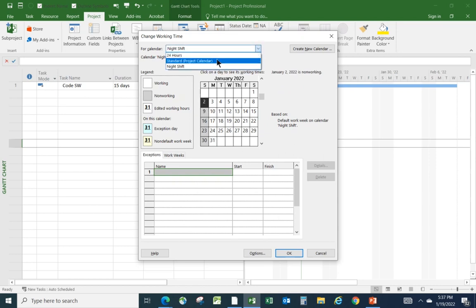Let's go back to the standard project calendar. So we've added in 1 holiday here. And typically what you would do is before you start the project, before you start entering a lot of information, you would run down through here and add in the national and organizational holidays that apply. So you would go with Memorial Day and Labor Day and Veterans Day, and in the US, the 4th of July and Thanksgiving, and so on. In the United Kingdom, you have the spring bank holiday and things of that type. So add those all in and go out, I would say, probably about double the length of your project. So if it's a 2-year project, I would probably put in 3 to 4 years worth of holidays. That's typically what I would do.